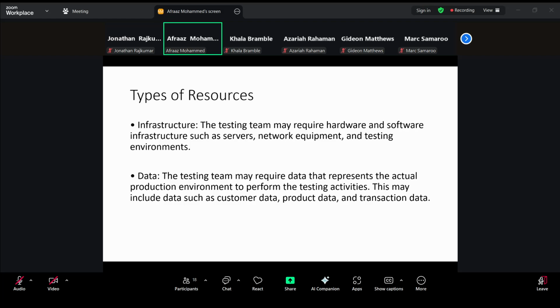It was, like if you had phone numbers and any phone number field, you had people, or CSRs, putting in the person's name, and the data had to be cleaned up a lot. So that sort of data sanitization usually takes a long time, right? So like if you're involved in migration, you need to be aware of that, right? Don't underestimate the data migration until you see the data, right? So you have to inspect the data before you could give a timeline for it.